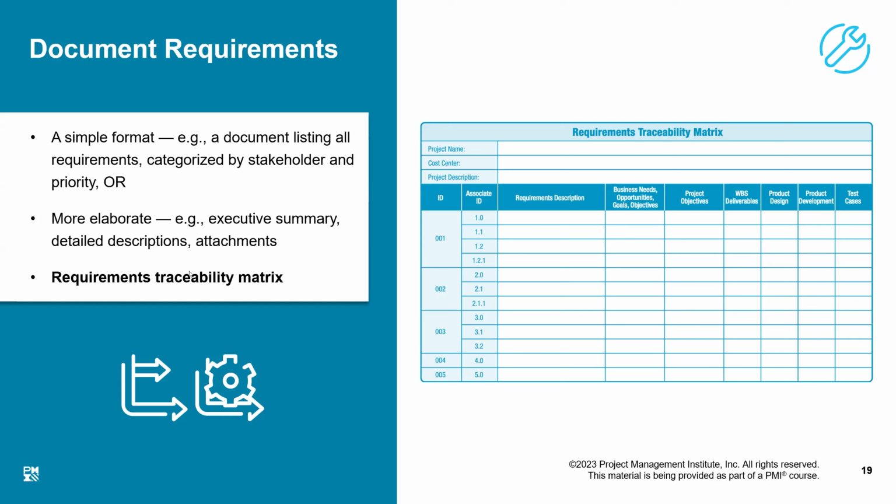Okay, so we were talking about the requirements, and I told you that in the next class we will start from the requirement traceability matrix. Now, requirement traceability matrix is a kind of a register in which we record all the requirements. This is how it looks like. We have a number for every requirement. We describe each requirement in the requirement description column.